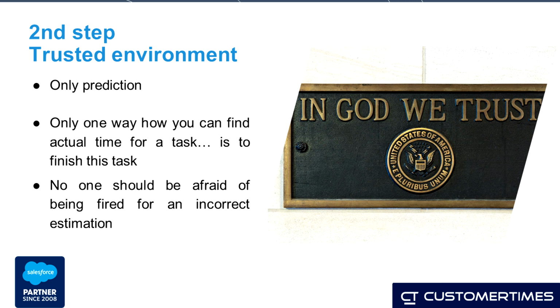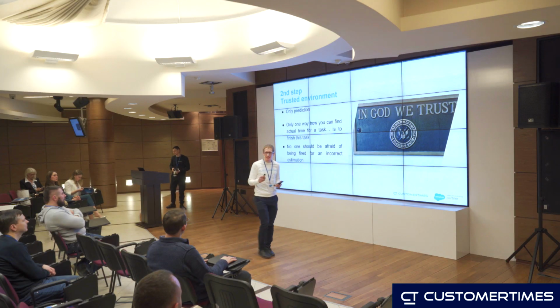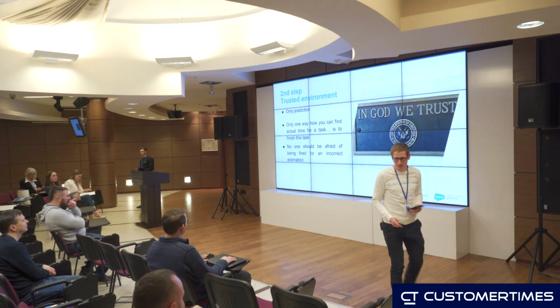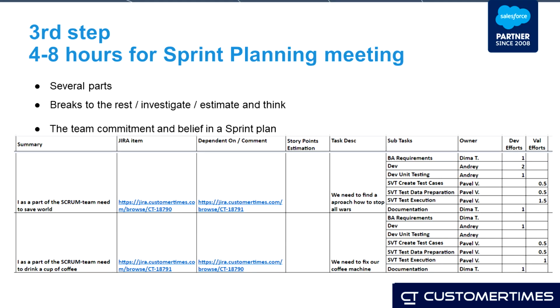I know only one approach to estimate a task exactly. Do you know about that? It's to finish this task, of course. Take enough time for sprint planning. According to methodology, for a 2-week sprint, it is recommended to organize a session of 4 to 8 hours.